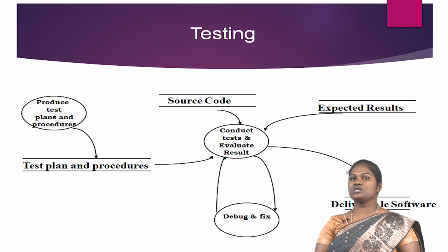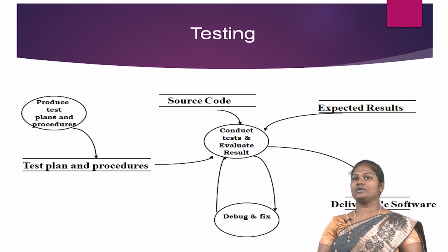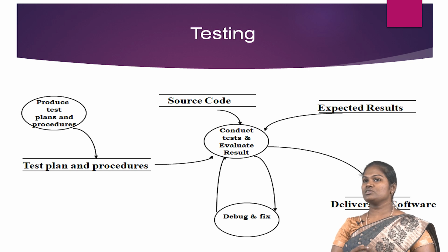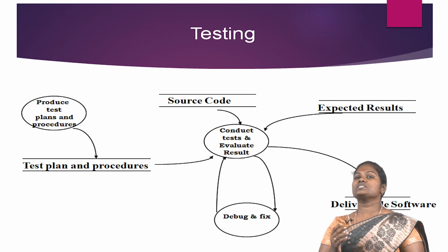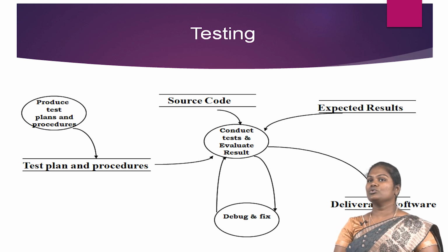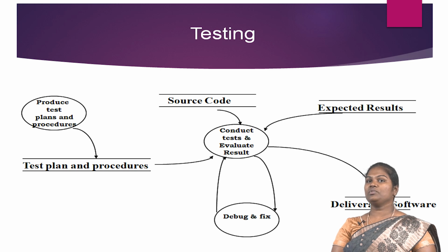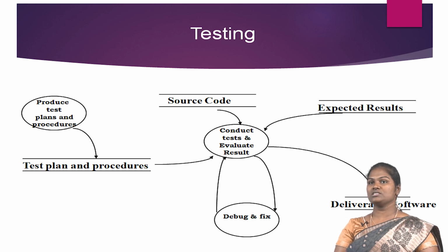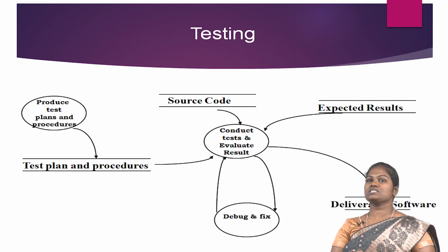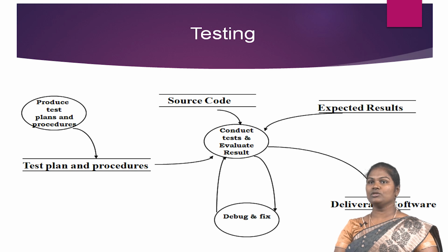The test procedure documents specify the required operator action and the input and output for each software test. Errors found based on the testing evaluation are sent back to the programmers to debug, and metrics are kept on the number and types of errors so that defect analysis can be conducted to determine the root cause for the errors, so as to prevent them in the future.